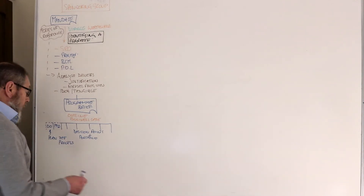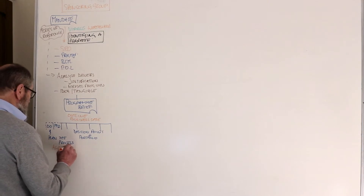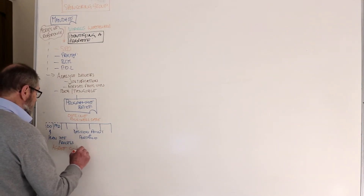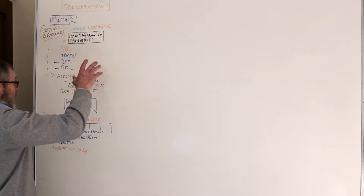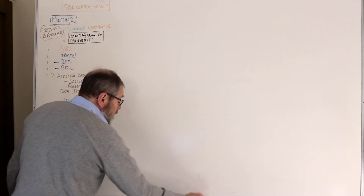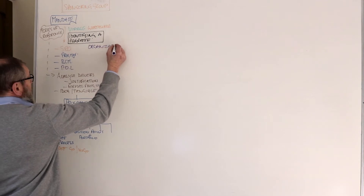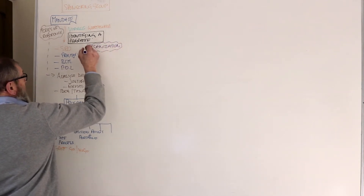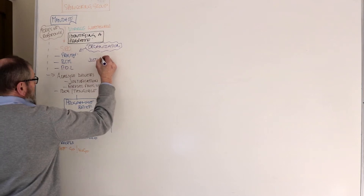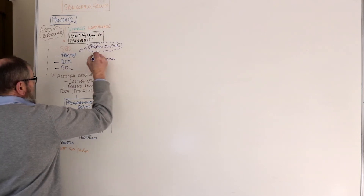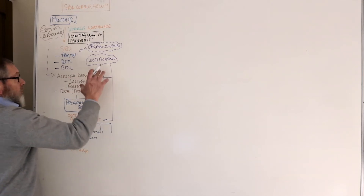At the end of the process, plan the next process or the next step. Alongside that, there will be decision-making about whether to go or not, so we need to agree a go/no-go perspective. During identifying a program, the two main themes are organization — because we need roles — and justification, because we have the business case and we're trying to work out the drivers.